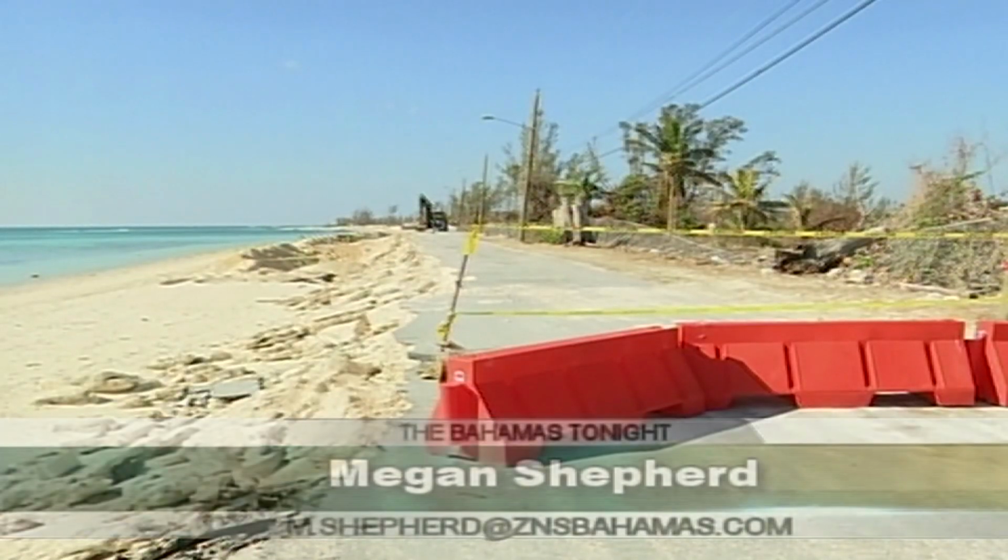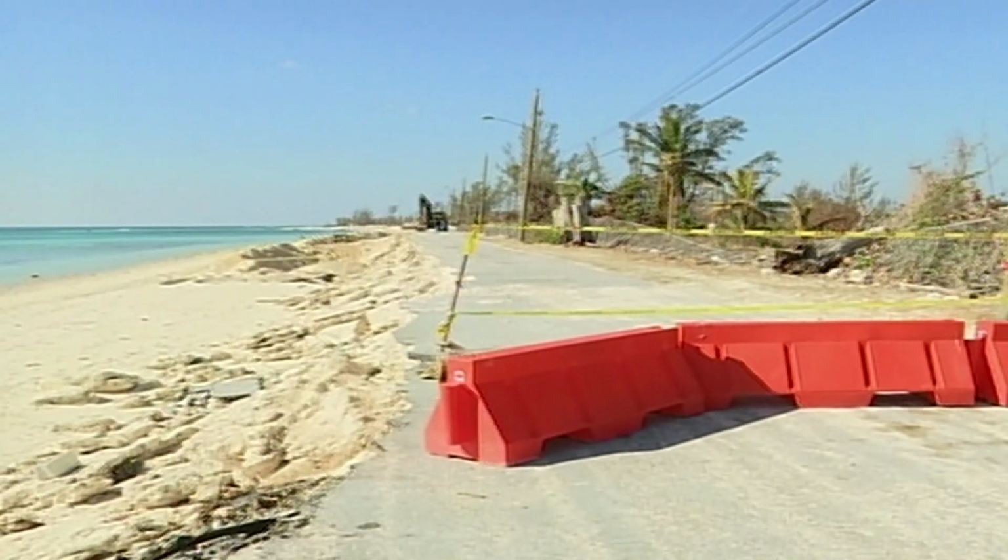We got about 600 feet of foundation, sand removed for the foundation. We're going to continue for another 400 feet, and then we'll start cutting into the rock foundation. Slow process because a lot of sand to be removed, but that's where we at right now.